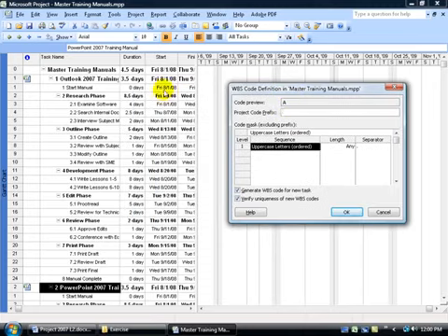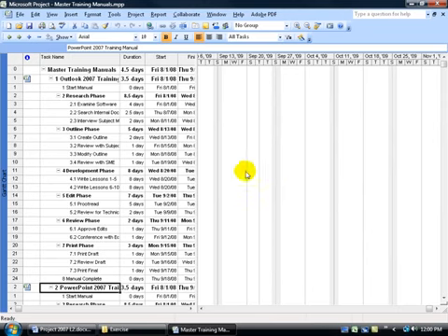So what that means is that for each subtask here in the master file, and the subtask is of course the separate projects, there's project 1, project 2, it's going to letter them as Project A and Project B. But let me make sure that I define it as the master project outline dash space and then click OK. Now we have everything set up. I've got my work breakdown structure code customized in my individual project files. Then I've customized one for the master file here.